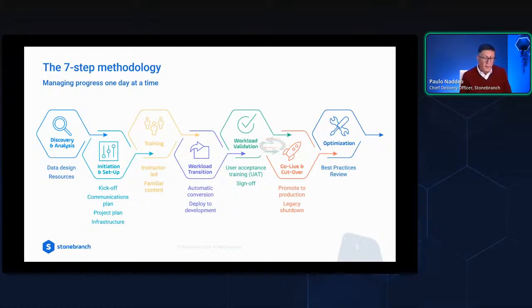And to avoid that, we break things into several different waves, as we call them, right? But they are nothing more than different phases into production. And these phases will apply to validation and go live and cutover. They do not apply to transition, right? So transition needs to be done in a single block, in a single phase.